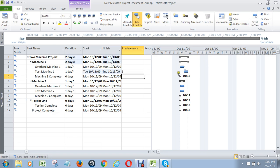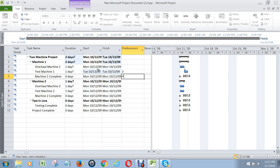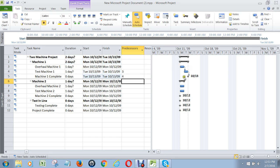You see how that put an arc down to the test machine activity, showing the order that these occur in. And then machine 1's overhaul and test is complete after task four — testing machine 1 — is complete. So I'm going to put a four there. See how that pushed the milestone out? Now, milestones have predecessors, but they don't act as predecessors themselves.